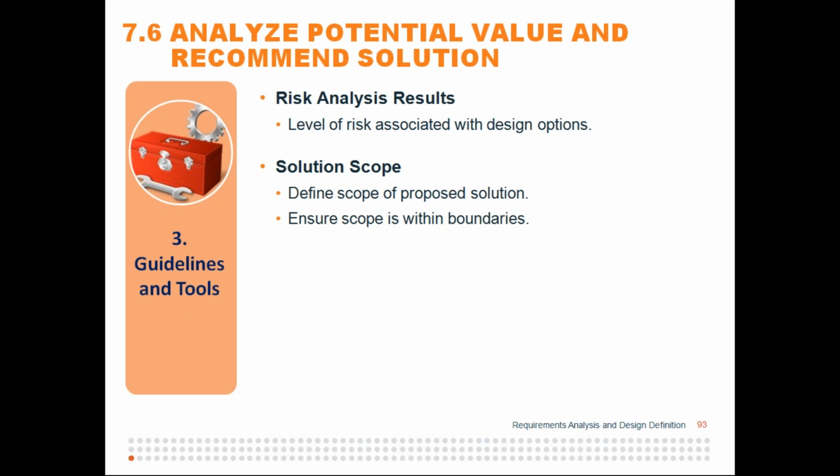And solution scope, we want to make sure we have that on the scope of the whole solution. So if you can get it all up front, that's great, because that seems to be a slippery slope sometimes. Scope tends to change, and our jobs tend to be managing that and keeping it in control. A lot of times what I find myself doing is I have requirements, and I just say, okay, this is going to be deferred. Not removing the requirement, it's going to be deferred for a future release. So we do that exercise.